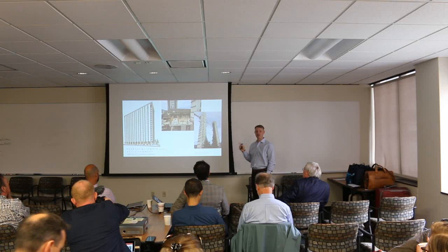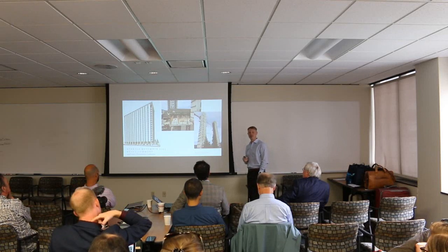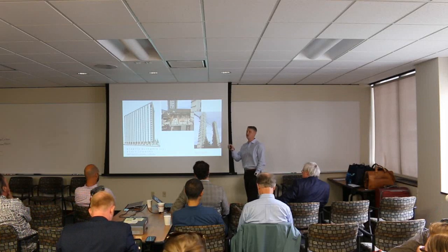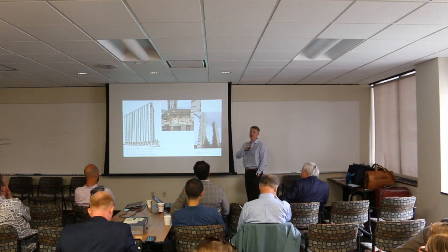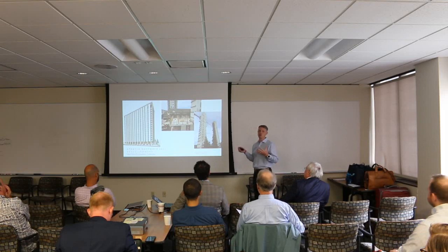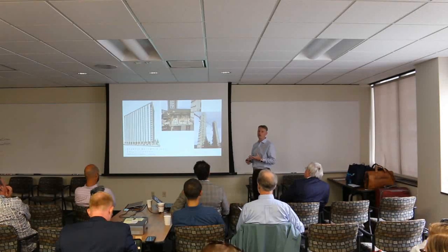But the beauty is that British Columbia has a Wood First initiative. And you actually have to go get bids. And you have to prove that wood actually doesn't work before you can go to concrete. And so they did this job. Seagate came in and said, well, we can do this building. We can do it as your subcontractor. We can get your frame installed and your building envelope installed in 18 weeks.